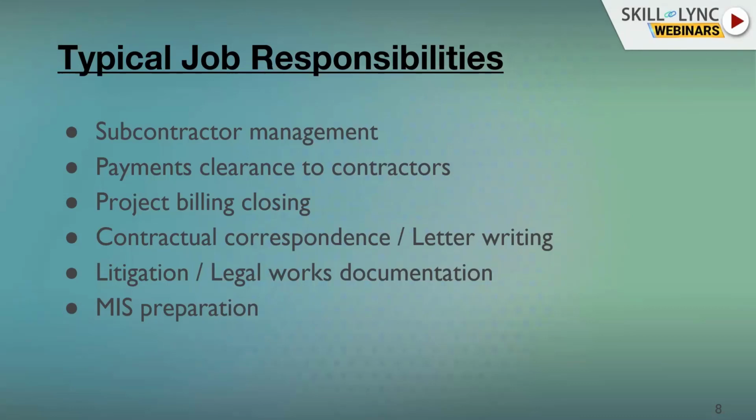Another thing is contractual correspondence and letter writing. So in a project, there will be contractual correspondence between developers, consultants, contractors. That correspondence has to be as per contracts, and the project costing is basically considered during the letter writing, and specific figures, specific escalation, cost escalation, liquidity damages have to be stated clearly.